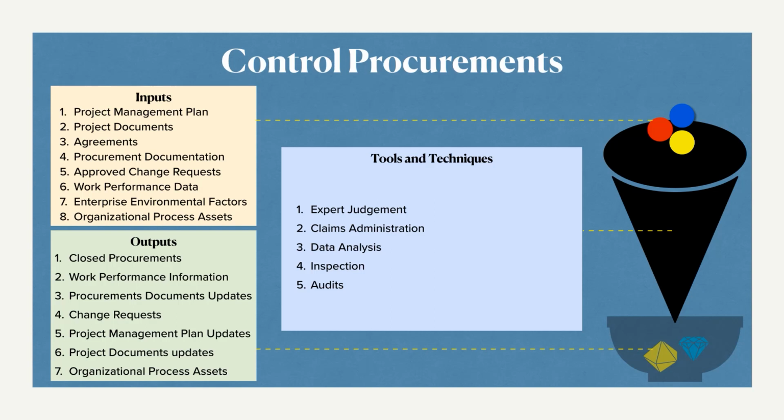The claims administration, I think this is something new. We can spend a bit of time here. Claims are a tough case. Let's say we have a quality issue in the product. Both seller and buyer do not agree that the quality issue is because of their process. So this little disagreement becomes an issue, and then it becomes a claim, right? A claim is something which has no responsible person identified. That is the escalated problem.